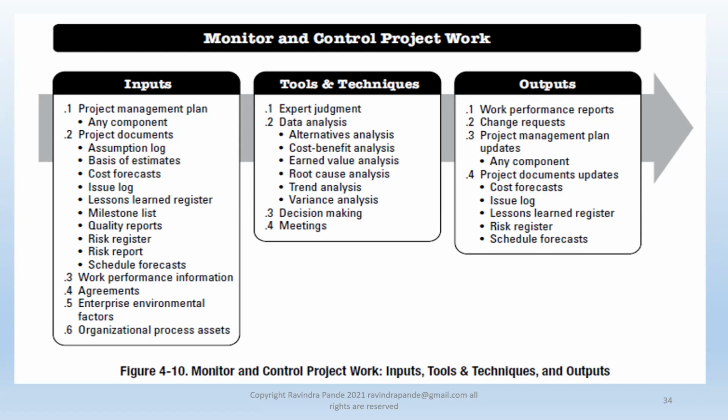In many organizations, there are around 10-15 metrics we track in terms of how much work we need to have completed till yesterday, how much we have actual, so it's like budgeted schedule versus actual schedule. And this is what you call variance analysis. It's a ratio between budgeted versus actual. So it's like budgeted hours or budgeted dollars to be spent for a given task to be completed, and then you get the variance of it.